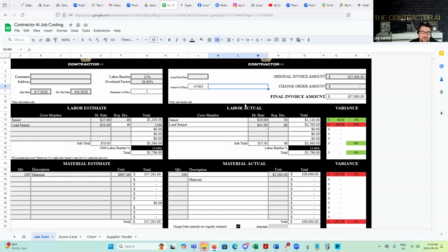Here's what you have to think about. A change work order should always carry a minimum of a 50% markup, period, full stop. If you are anything less than that, my friend, you're in for a world of pain. The reason why is you had to stop that job. You had to change your course. Anything less than 50%, I'm going to say is an underbid. You've actually now lowered your overall profit on the job.